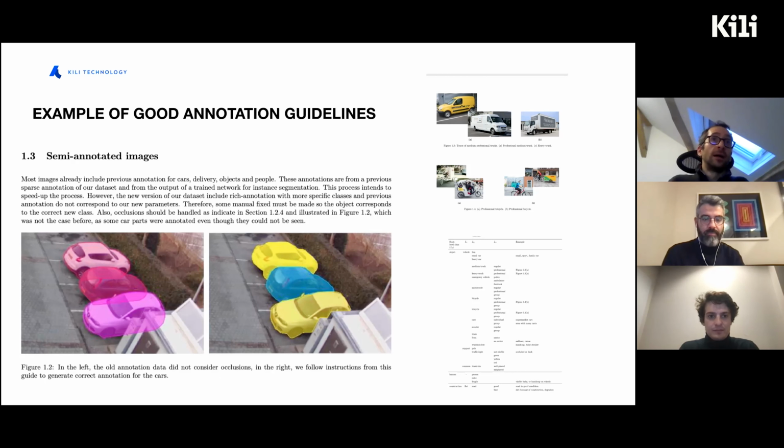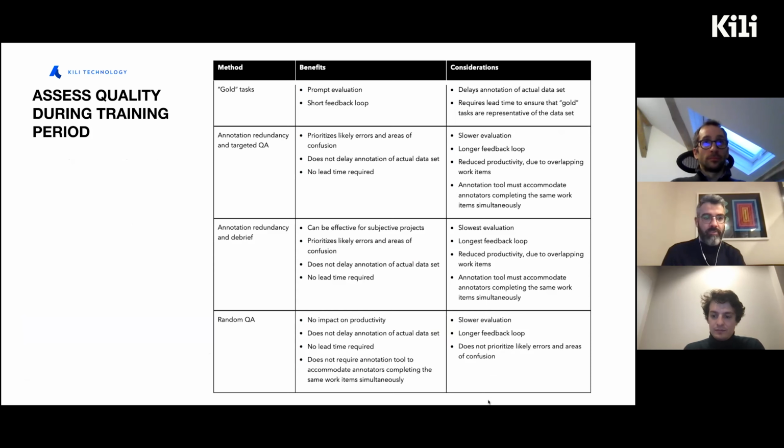It can be dangerous because at some point, for example, I had this issue: some new labelers arrived and we didn't update the guidelines with all that was said after, and they relied on the initial guidelines, and there was some big difference. So I would say again, it's important to have good initial guidelines, but even if it takes time, it's probably important to update them if there are some big changes during the project. Okay, clear. Thanks a lot. I think it's pretty clear for the guidelines and the training point.